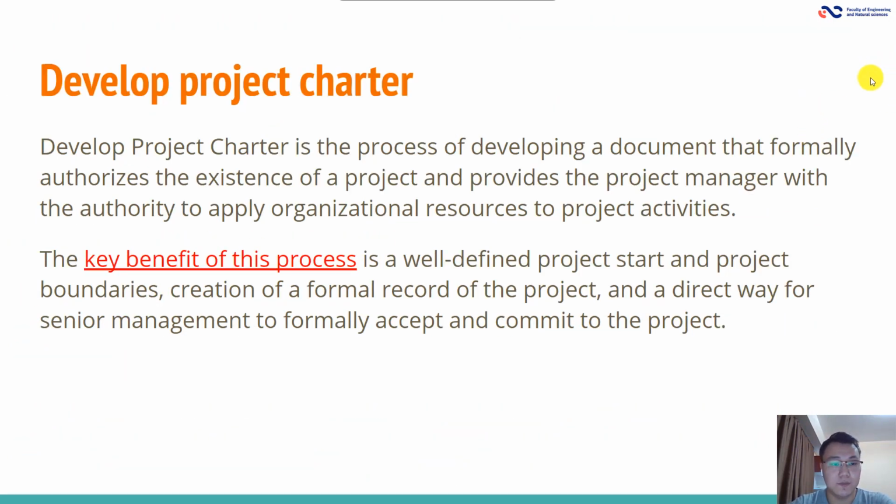Develop project charter. Develop project charter is the process of developing the document that formally authorizes the existence of a project and provides the project manager with the authority to apply organizational resources to project activities. The key benefit of this process is a well-defined project start and project boundaries, creation of a formal record of the project, and a direct way for senior management to formally accept and commit to the project.